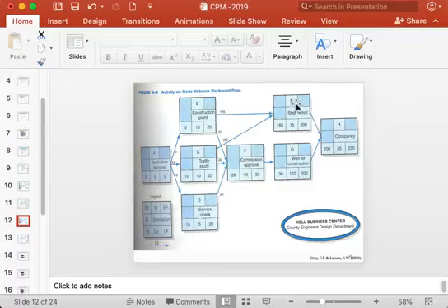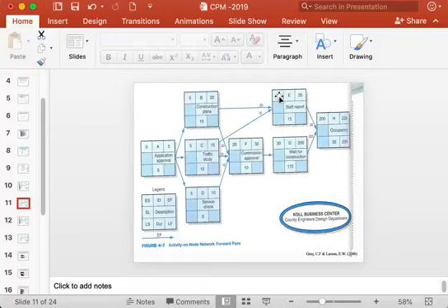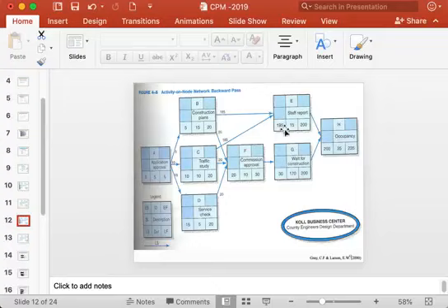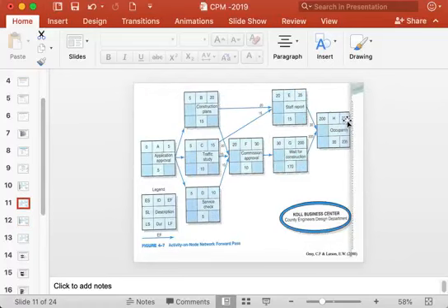So activity E can actually start at the latest after 185 days instead of 20 days. After 20 days, activity E can actually wait until 185 days, taking its own time of 15 days. It will finish after 200 days, and H can start after 200 days, and it will take 35 days, and it will finish after 235 days, which will not delay the project because here it is 235 days, same.